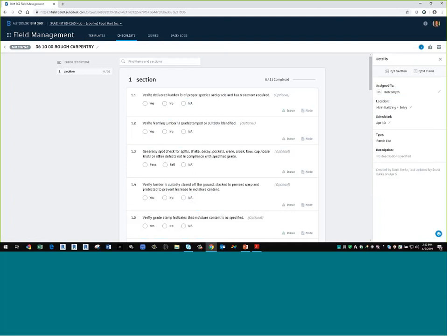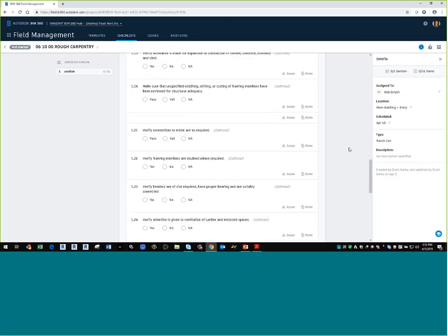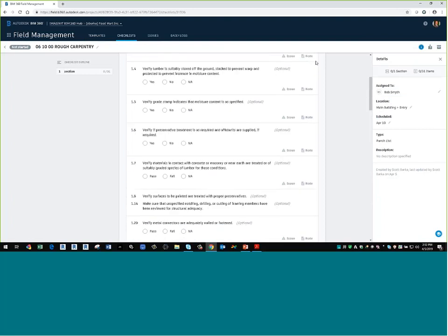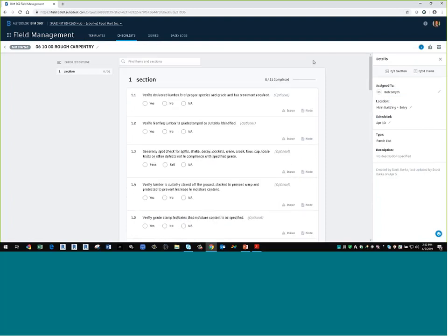It's just been assigned to that individual. They need to go in and basically now fill that checklist out. So they pull their iPad up, synchronize it in the office, go to the field, fill out the checklist. Again, if there's a no here, when you fill that out in the field, that will automatically generate a template for the issue, and then you fill out the issue information. So all of that, again, managed through this one place.